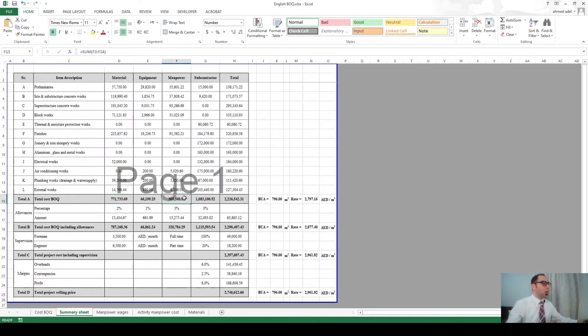Now let's talk about, for example, the manpower. I have here manpower of 305,000. I have not considered any idle manpower. Sometimes I'll send 2-3 laborers, or 5 or 10 laborers to the project, and they will not have anything to do due to restrictions or anything happening at the site. In that case, I am losing that day, because I will pay the laborers that day and they will not work. So I am allowing 5% extra on top of what I have already considered as money that I will pay to the manpower due to idle times and all these things.